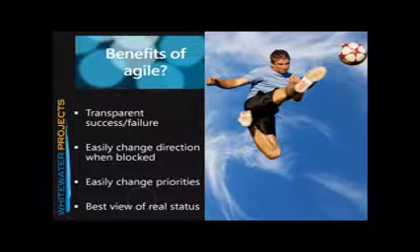Transparent, success and failure. I was able to show the project sponsors where we were, and we were able to quickly change some of the architecture decisions we had made that were significant. We were trying to put in a new piece of architecture that would significantly save money for the organization over the long term. But unfortunately, we were trying to put it in on a project that was federally mandated with a deadline. So we had to pull that out. But this was like the heart of the EDI system, electronic data interchange, right? And it was the backbone of the EDI data transfer system. So architecturally, this was the heart of what we were doing.